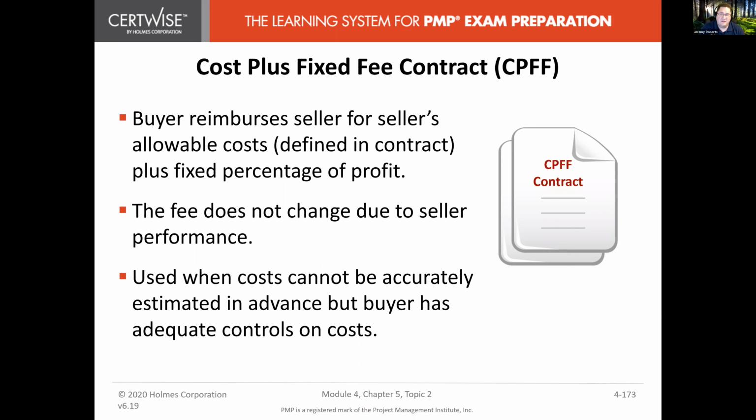Based on this, you can factor what the maximum cost will be for a contract, because the cost is really the only adjustable factor here, and then the fixed fee on top of that. But if the fixed fee is a percent, then that might be adjustable. But you can do the math and figure out what the total cost for this will be.